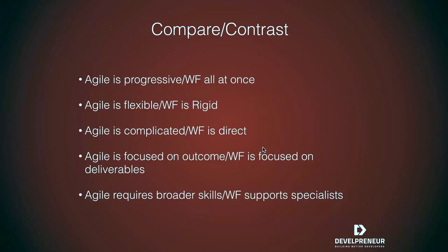I better have a requirements document, and it better be a solid one. When I get done with the design phase, what should I have? I better have a design document, and so on and so forth. Even at the end of the testing phase, I should have the scripts that I've executed, and here's what failed, and here's what's passed. And maybe you have some history on that, well, this failed, and then we eventually fixed it. But at the release level, this is what we tested, this is what passed. So when we go into that deployment, we have that documentation.